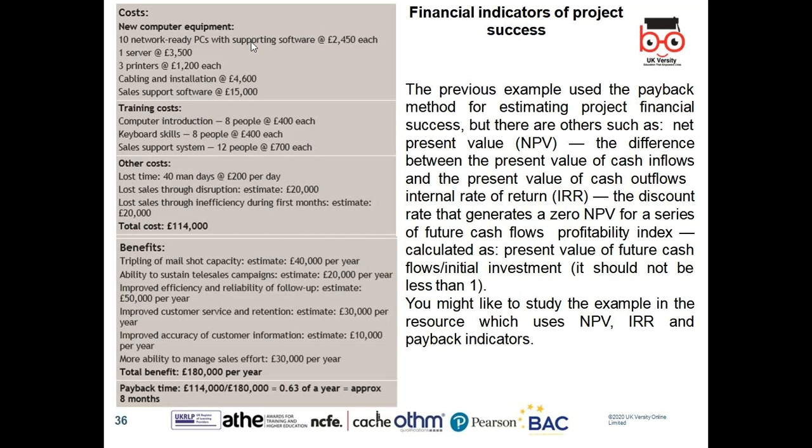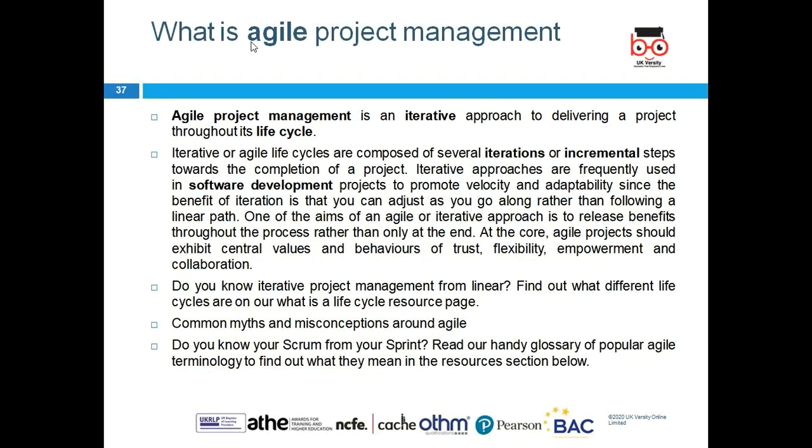So we can look at NPV, the net present value. If it is positive, we accept the project. Internal rate of return, where we are looking for more than what we expect, and the payback period.